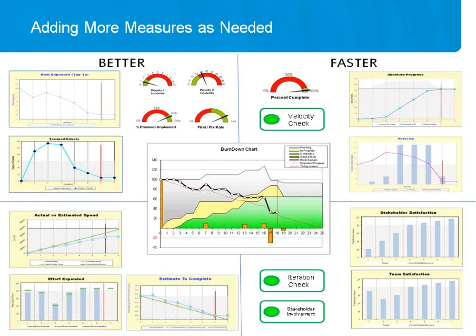The 2 patterns that you see in those graphs in the bottom right hand corner: often the stakeholders are resistant and don't like the idea. They're scared of all this agile and this iterative stuff. So they might start quite low, but you should see as the iterations are effective that starts to rise. The team satisfaction shows the kind of dip in attitude you can get sometimes as they actually find out this is quite hard and requires them to measure things and test things and do things. So they might get a little dip in their happiness, but they should again come out. So those can be interesting things to track.